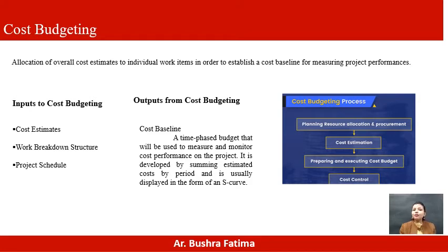To create an effective cost budgeting plan, a total budget for the entire project must first be established. To achieve this, each area of the project must be analyzed and given a particular cost estimate. Once that is done, the total sum of cost assessments, whether those costs are for individual projects or work packages, are combined to establish a certain parameter to provide a working guideline for the budget. These guidelines are set in place so that the allotted costs are divided up among the appropriate project needs. This will ensure that the budget goals are being accurately met. The process of cost budgeting is a simple yet necessary process of any successful type of project management.